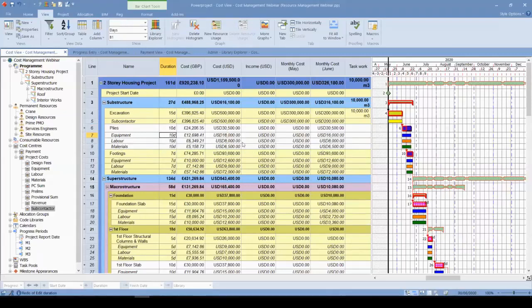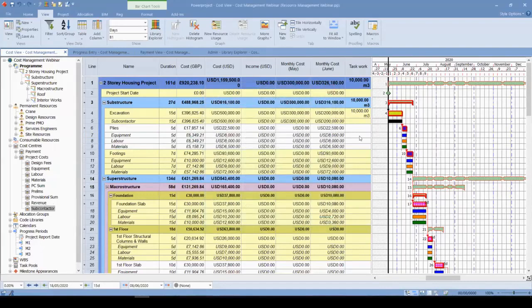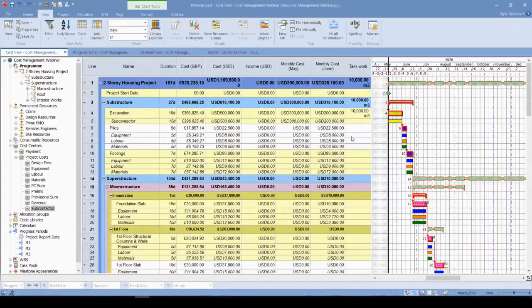That is why once the duration is increased or doubled in the sample, you can see that the cost is always doubled accordingly. So these cost calculation types always cover the income as well. By drag and drop we can allocate our incomes as well and calculate the income according to our quantity. It can be time-based or any fixed cost.